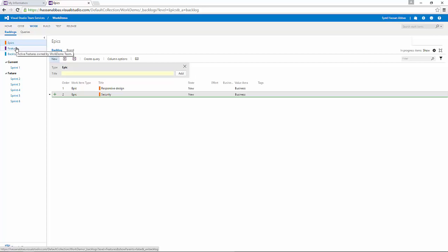Maybe one feature will be released in one release, but when maybe 5 features are released, then this Epic item is complete. Because those 5 features were mapped to this Epic item, your Epic item can span multiple releases. So it might take a little while to get it complete.